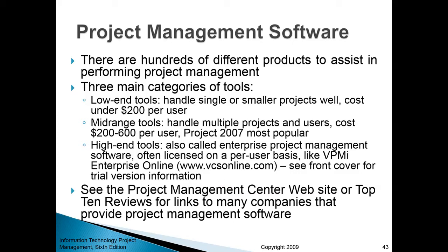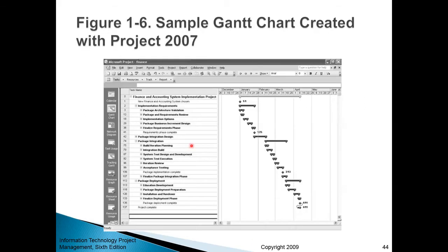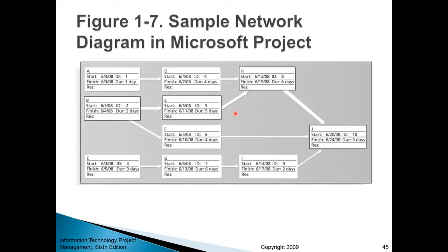I just want to show you a couple of slides. Here you see something that looks like a Gantt chart. On the left side you have tasks or the overall work breakdown structure for your project. And for each task you will specify duration, the start and ending time. You will also specify milestones. And Microsoft Project will generate this nice looking Gantt chart. Then you can rapidly switch to a network diagram. Based on that, it will create a network. So here you have not only the tasks and their due dates, you also have their relationships or dependencies.